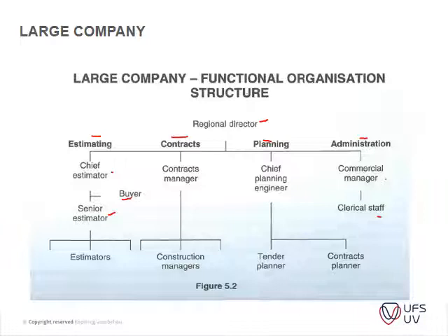So they usually negotiate the best prices. And then you've got maybe a team of estimators below, and then your chief estimator will be responsible for pricing of your tender document. Then you've got your contracts manager. He's responsible for the planning, scheduling, and usually your requirements like your tax clearance certificate, completing the tender documentation, excluding the BOQ, etc.